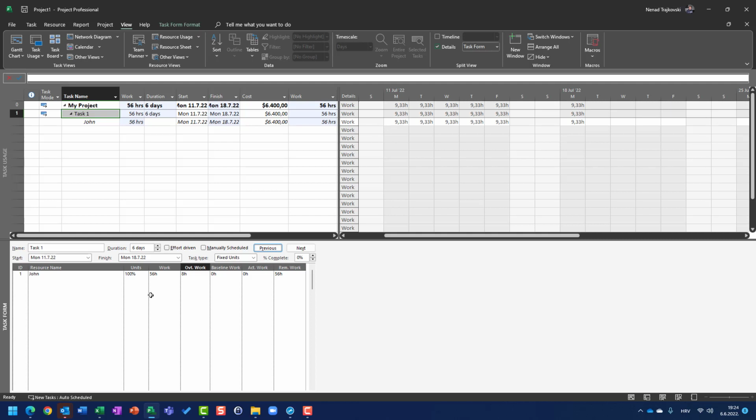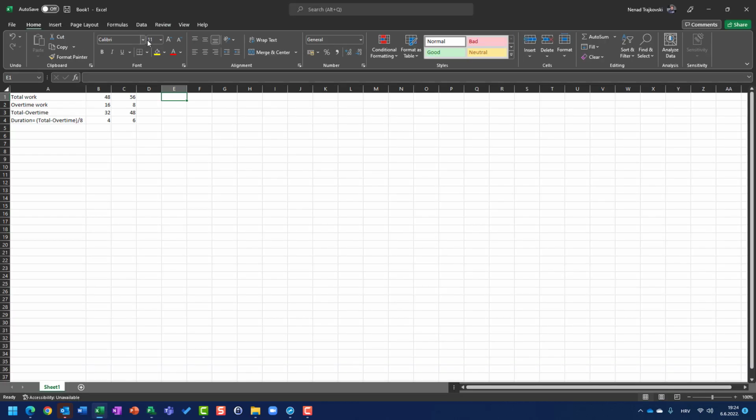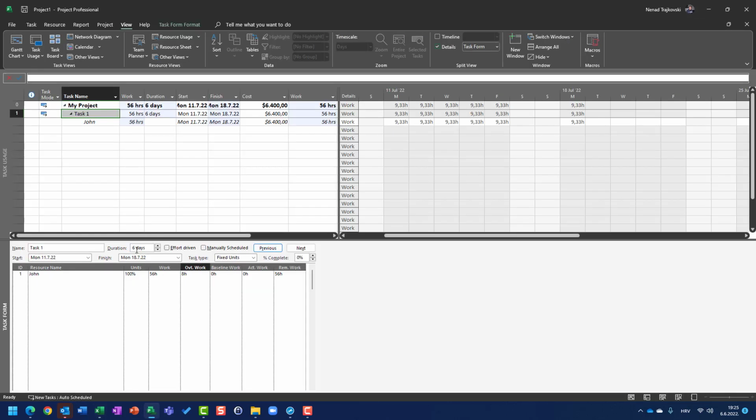How is it so? Let me show you. So 56 hours is total work. Overtime work is 8 hours. Total minus overtime, 56 minus 8, is 48 hours. And 48 hours divided by 8 hours per day is 6 days. This is where these 6 days come from.